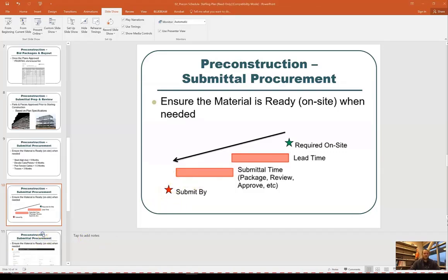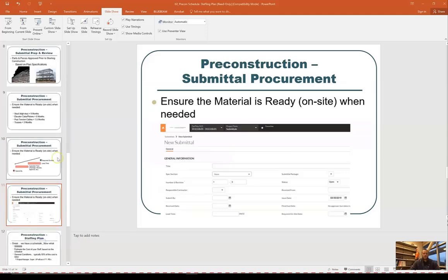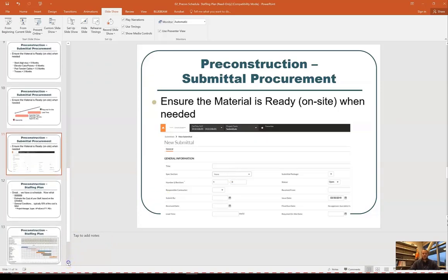Okay, so again, working our way backwards just to figure out when we need to submit this buy or when we need this subcontracted. Procore, a lot of the different tools. We would use an Excel document just to track, because each sub just has a different procurement. This is extremely important. We get into this more in the job site management class, if you've taken that, just trying to track how long each subcontractor is going to take.